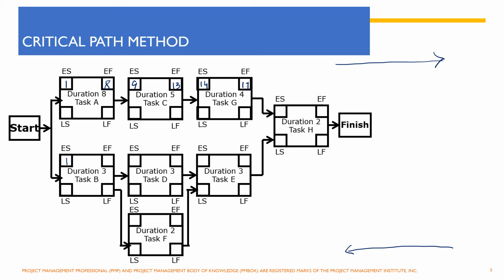So it will get over on 17th. And now coming back to activity B, it requires 3 days. So earlier finish date would be 3. Now there are two activities which are starting after completion of activity B. So activity D and activity F both can start on 4th,